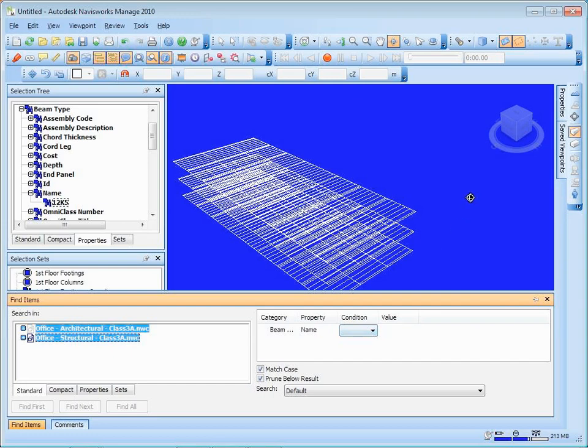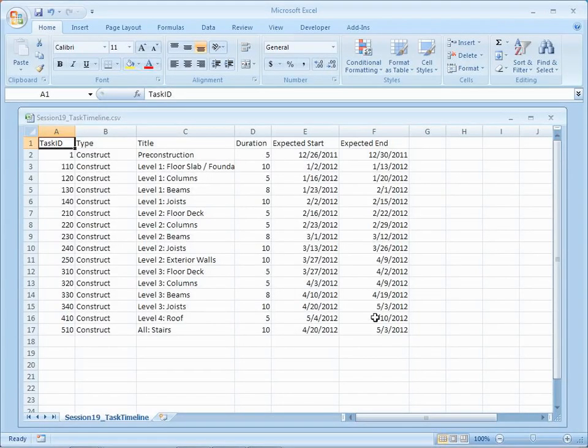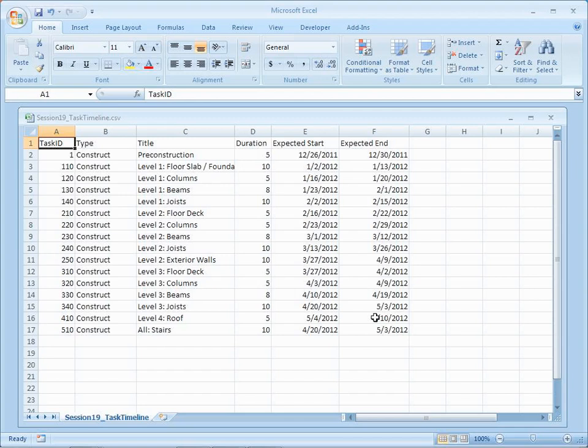Let's back off and think about what we're trying to accomplish. Ultimately, you're trying to get all the different columns associated with some task ID, all the level B1 beams associated with an ID, all the level B1 joists associated with an ID. The deal is, you're actually pretty good at figuring out where the beams and columns and joists are, whereas Navisworks is having a little hard time doing that mapping. So if we can use your intelligence to tell it which elements to map to which task IDs, it'll make your life a whole lot easier.